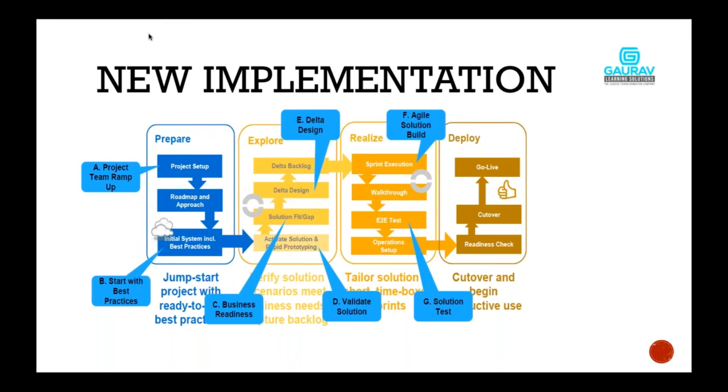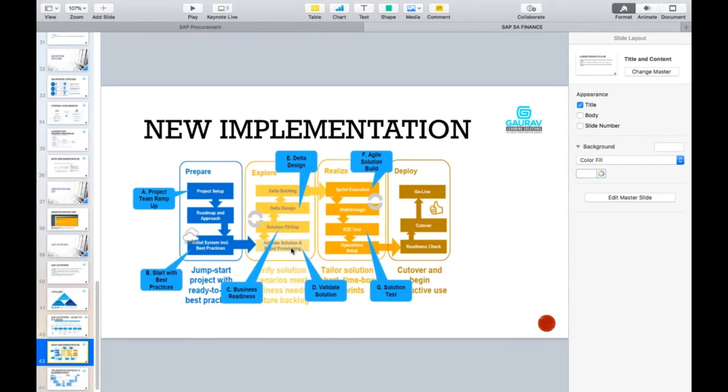One of our customers, we were explaining the EBS process, the electronic bank reconciliation process. Now the customer said, yes, it is a very good functionality available in SAP, but we want to automate it. We want more levels of automation, which is not possible in the standard system. So they said, we want to add these things in our custom object. Looking at the requirement, first of all, we identified that particular feature as a gap. Then we understood what the customer wants, and we wrote that in the functional specification document.